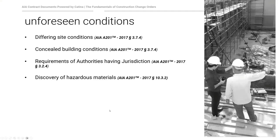Next, the more common reasons for a change order are unforeseen conditions. The first and most common is differing site or concealed conditions — unknown subsurface conditions, hitting rock, unsuitable soil. AIA A201, paragraph 3.7.4, delineates in detail how this should be handled. Mold is another example on existing buildings, as are hidden pipes exposed when opening walls. These are all legitimate change order requests by a contractor.